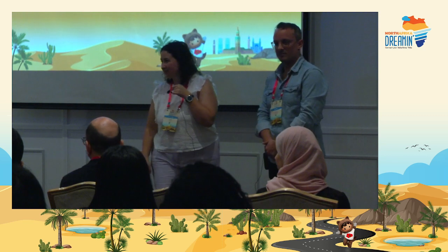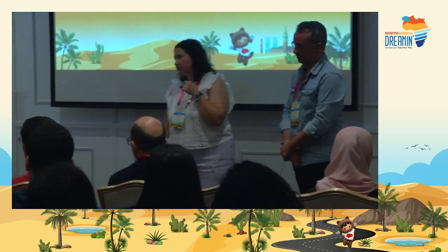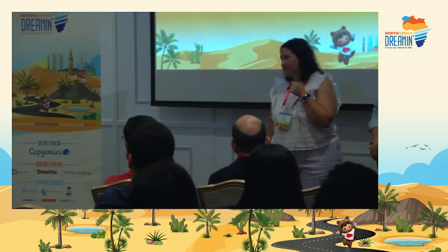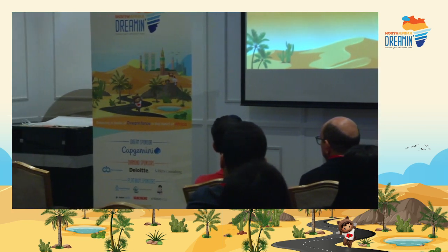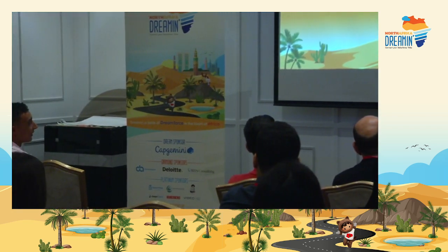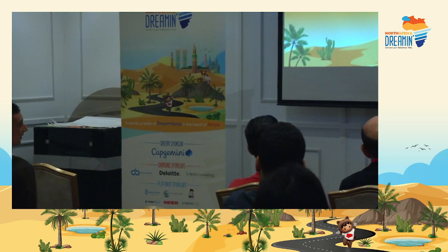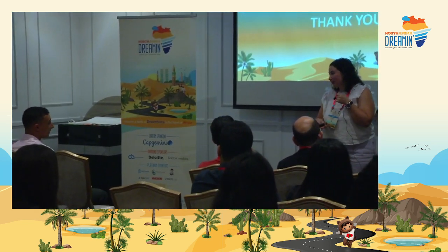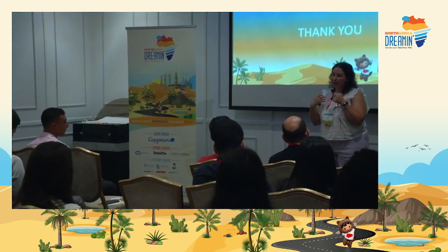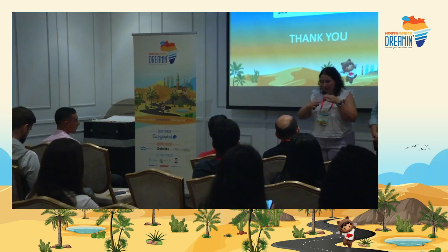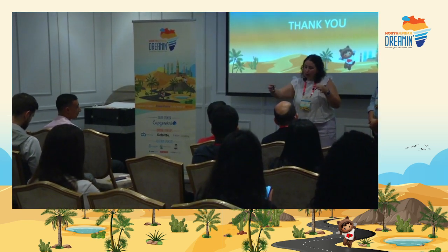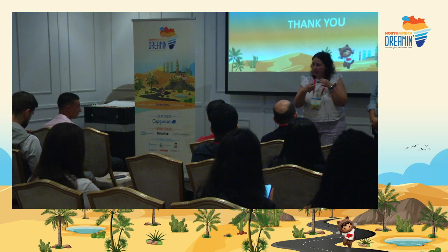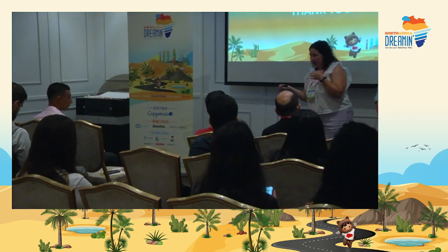Yeah. You said that sometimes you realize you spend 20% of your time working on edge cases. What do you think you have to do instead of working on the edge cases? I mean, sometimes you don't have a choice, so you just have to work on them. But if you plan and identify them beforehand, you can build your global template to absorb those edge cases, so you don't actually build the edge case until you have to.